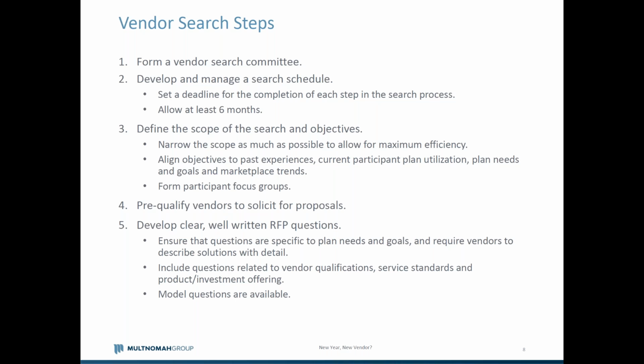But I think it's important to have a clear and relatively narrow scope that you're trying to accomplish to maintain the efficiency and to limit the likelihood that this project will get out of hand and become kind of burdensome to you as the plan sponsor. In addition to narrowing the scope, I think it's also important to define the objectives at the outset, because there can be a tendency, if objectives have not been defined clearly, for those to change based on the interactions and the responses from the vendors that you're submitting proposals to.